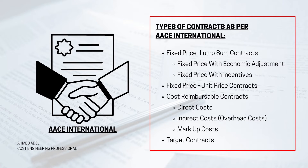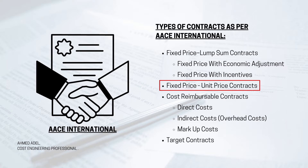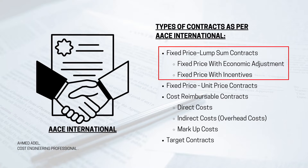Starting with the types of contracts as per AACE International, we have four main types: fixed price lump sum contracts, fixed price unit price contracts, cost reimbursable contracts, and target contracts. AACE also splits fixed price lump sum contracts further into fixed price with economic adjustments and fixed price with incentives.